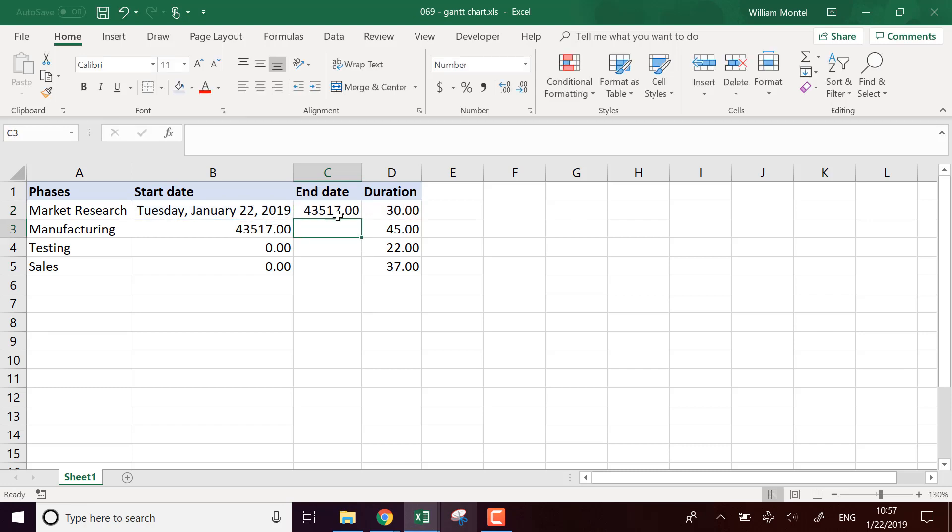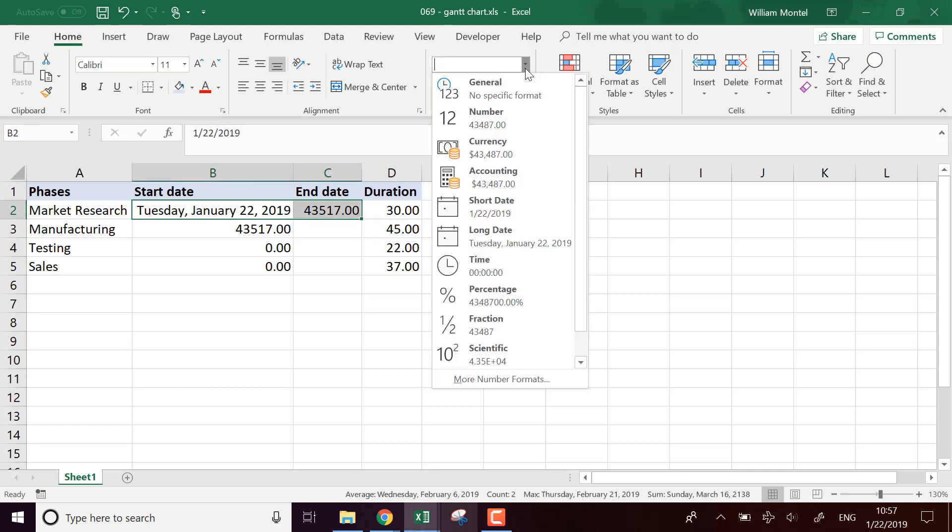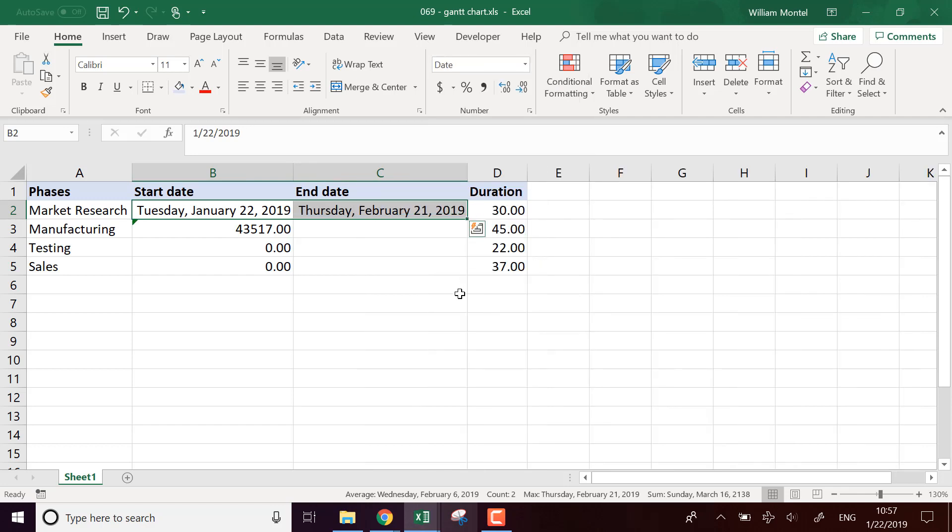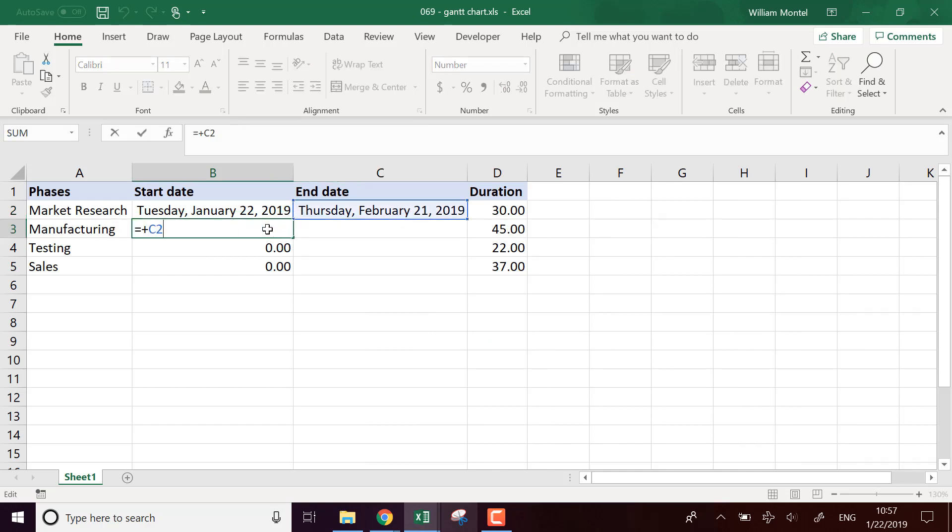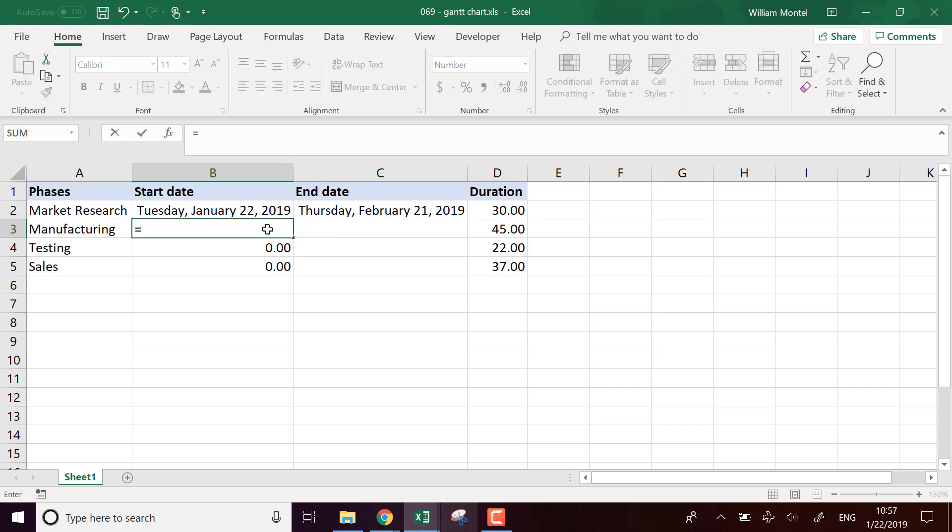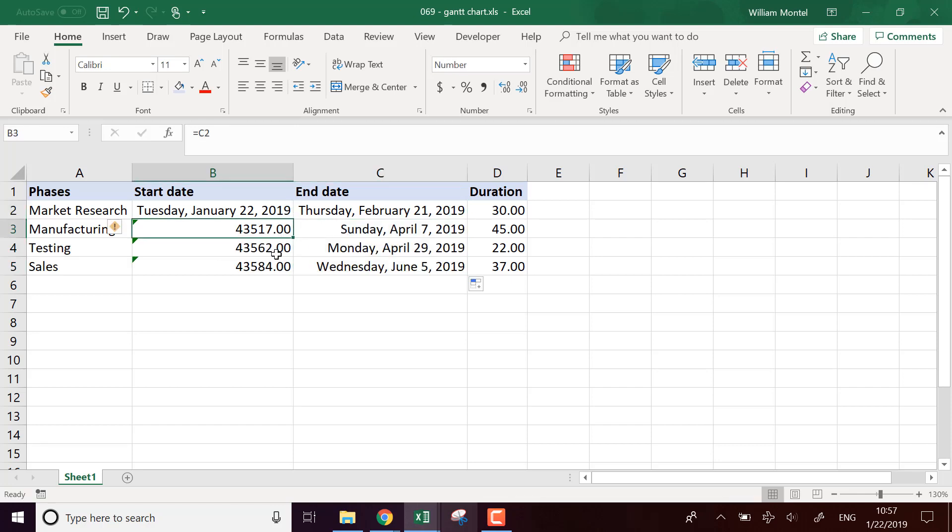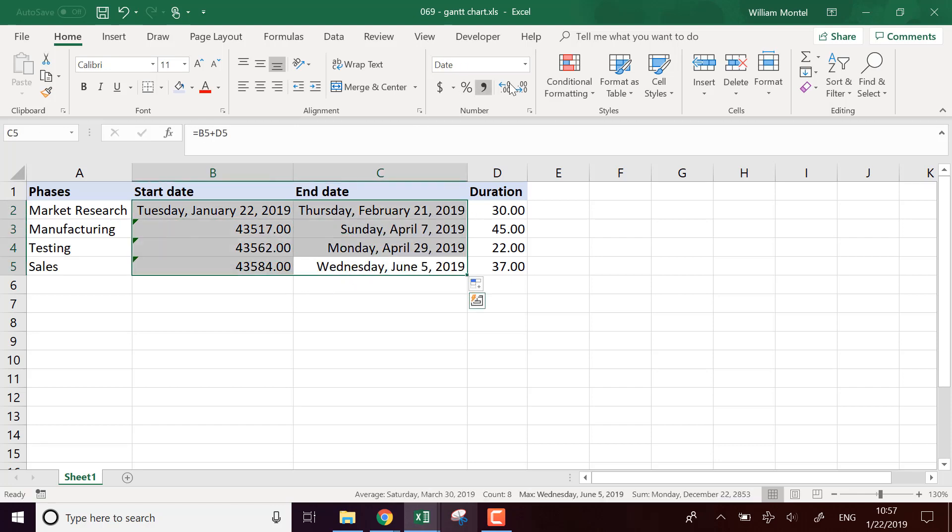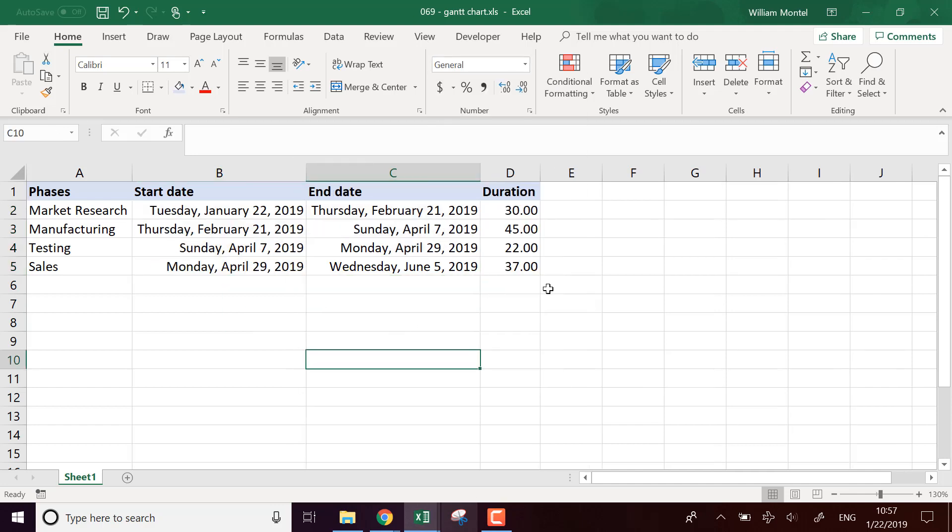But you could have different formulas, for example where you know the end date and the start date and the duration is the result of a formula. It depends on your project. So I'm going to put everything as long date like this and say that each time the next phase begins on the day of the end of the previous one. Here I'm going to put all the formulas like this and put everything as long dates. So here I have all my phases, start date, end date, and duration.